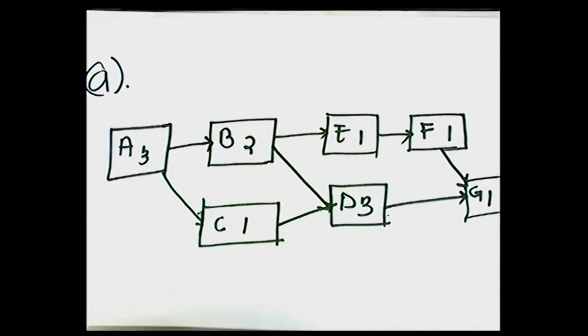Now, a critical activity, we would say, is an activity in a network diagram that has a zero slack, or that has no delay time available. And so you would make sure that that activity is taken care of, or you add all levels of seriousness to ensure the activity starts and completes within the time frame stipulated. So let's see how we're going to find these critical activities.